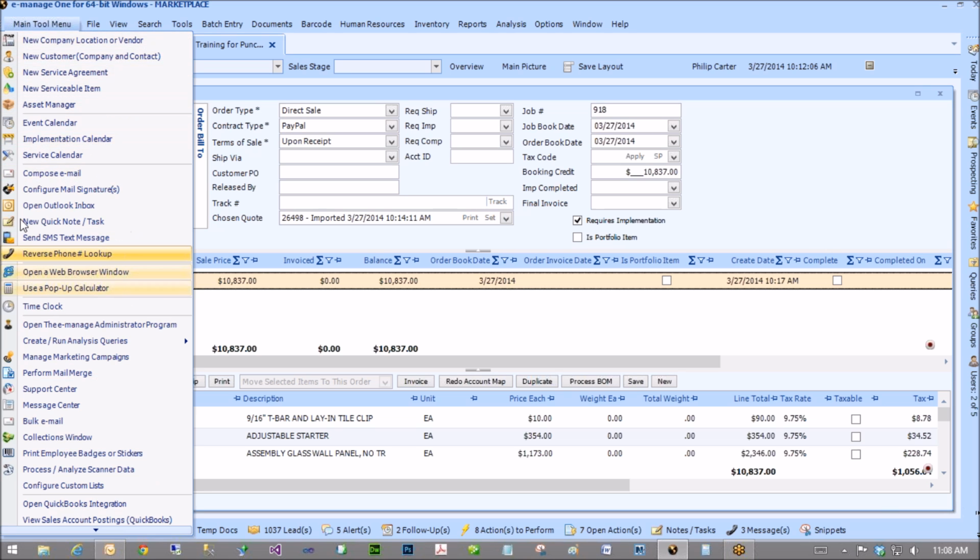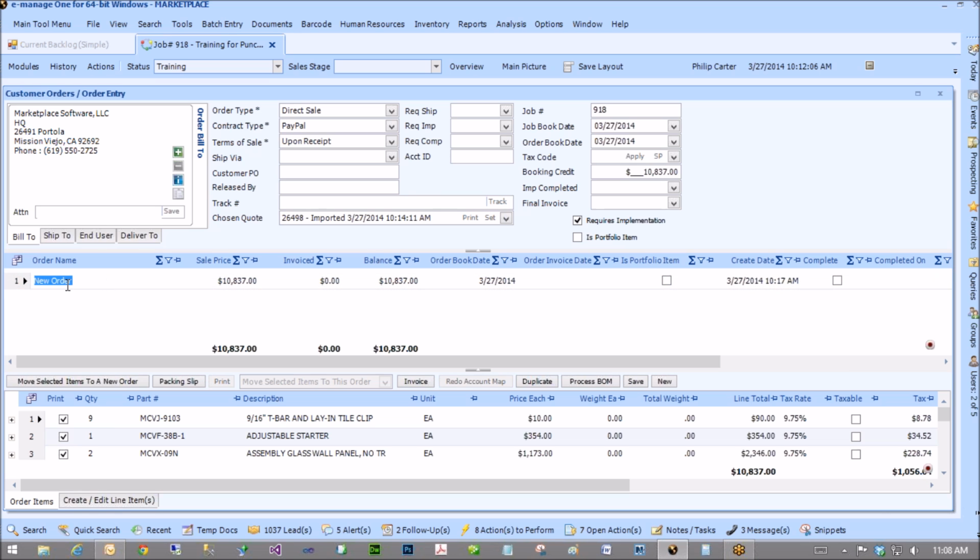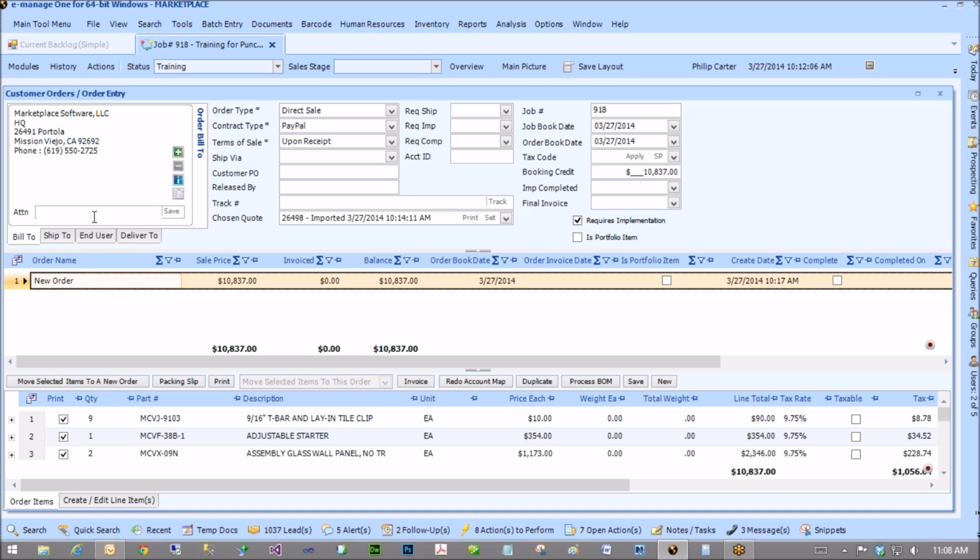So what we want to do is run those things through orders. Also, if you've used Service at all, you know you have a separate calendar for Service. So you're looking in two different calendars, and there's really no need. And you don't even have any action items on service tickets. If you want action items, you want to look at one calendar. And if you need the cost of that punch list against the project, you need to do it on the project.